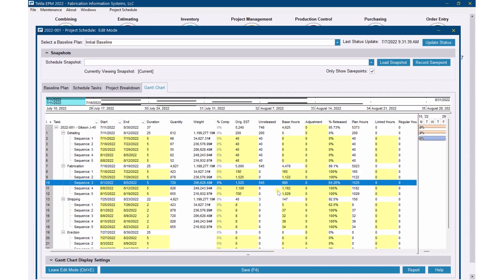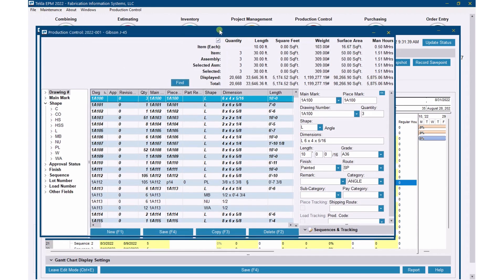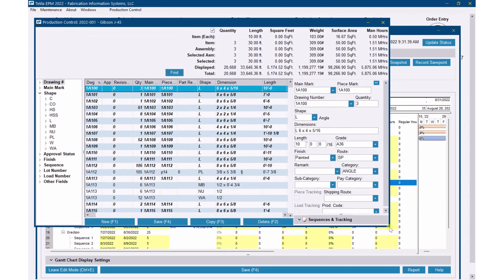Think of it this way: the base hours is the re-estimated hours, and that's really what you want to be using on your final production or shop schedule, because that's the actual work going in the shop — not necessarily your original estimated hours. Where do these base hours come from? Let's go look at that. I'm going to go back over to my production control job.